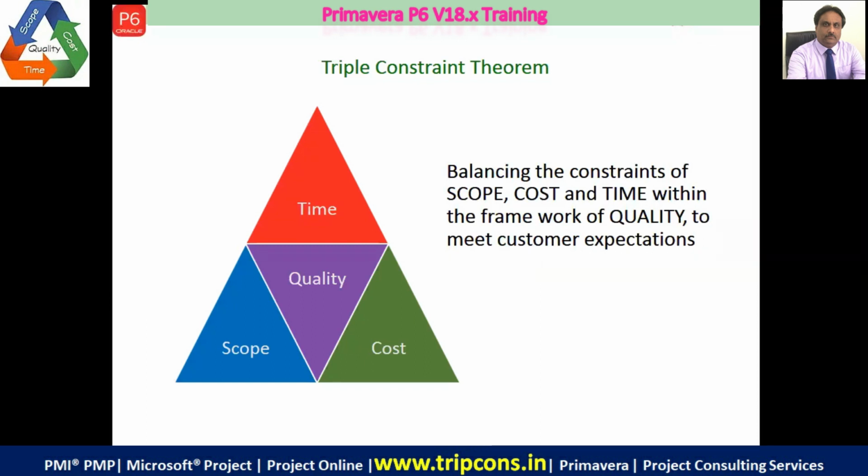And then you say, okay, yes, because if the objective is bigger, then you have to tell the client upfront that you need more time. If the client says, look, I don't have much more time than this, then what should you be doing? You should be negotiating with the client and trying to identify which are the high priority features that will fit within the given time constraint. So that's a very good business practice, okay? So that you can meet the expectation.